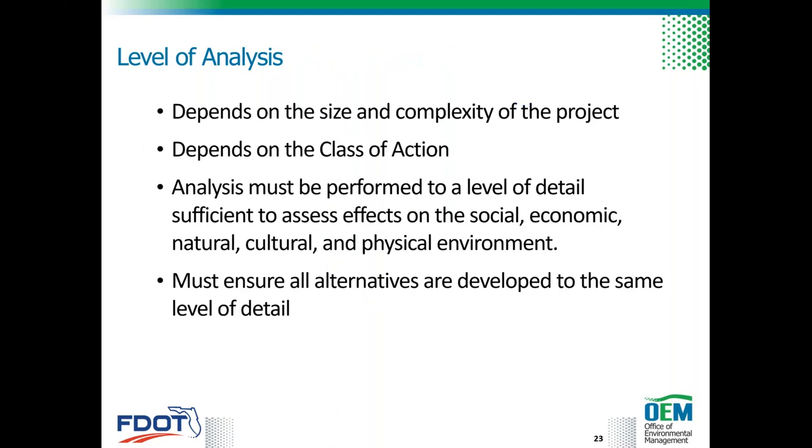The level of analysis depends on the size and complexity of the project. It depends also on the class of action. The analysis must be performed to a level of detail sufficient to assess effects on the social, economic, natural, cultural, and physical environment, and must ensure all alternatives are developed to the same level of detail.